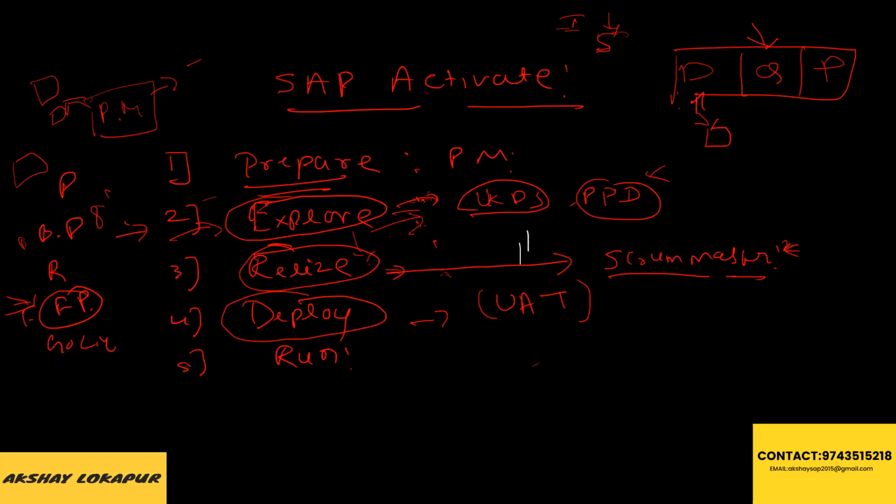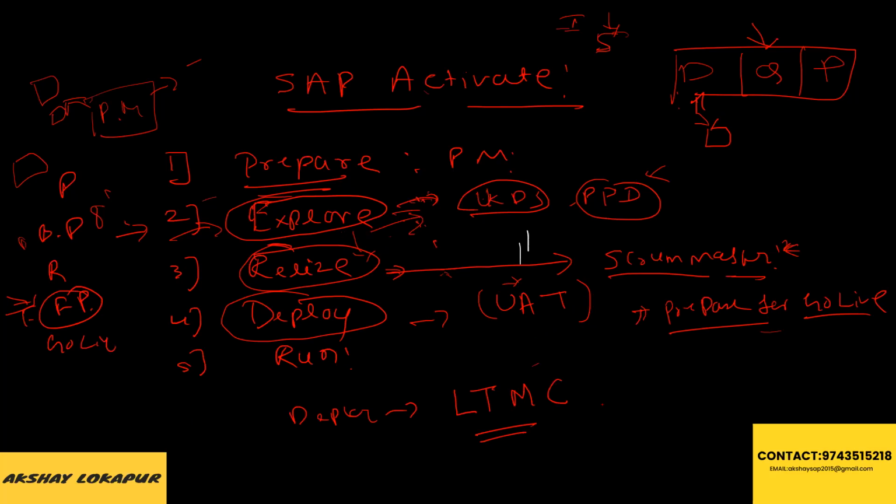Whatever test scripts we prepared in the realization phase, whatever testing we have done, the same thing these people will use in the deploy phase. They will prepare everything, and then we'll prepare for go live. Before going live, we'll upload the master data here in the deploy phase. In the old system, we used to upload using LSMW and BAPI. Here it is simplified. Using LTMC we will upload master data, LTFT, and through BAPIs.